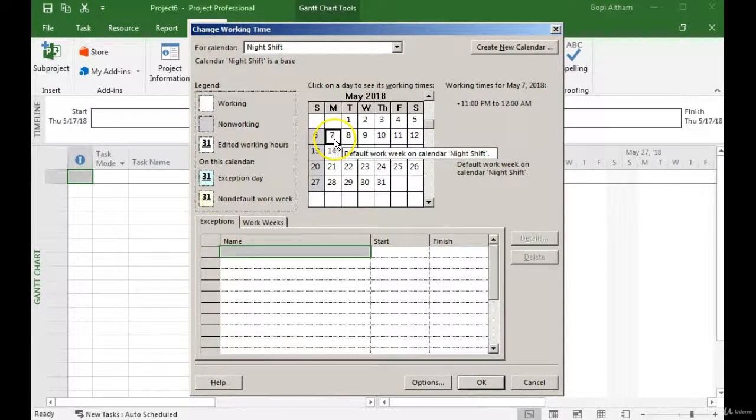The night shift starts from 11 o'clock in the evening and it will go to next day morning 8 AM with 1 hour break between 3 and 4 AM. Again, next day shift starts from evening 11. It will go to the next day up to 8 AM.